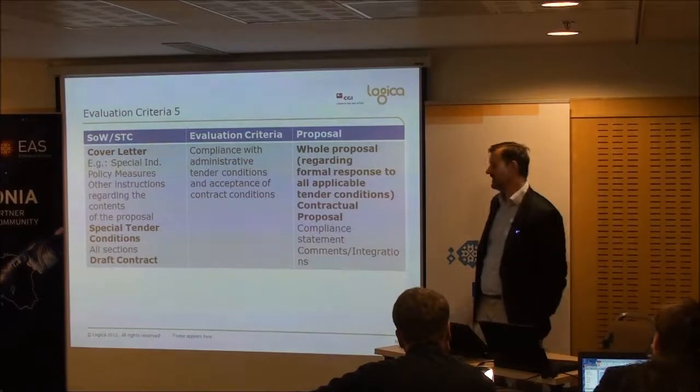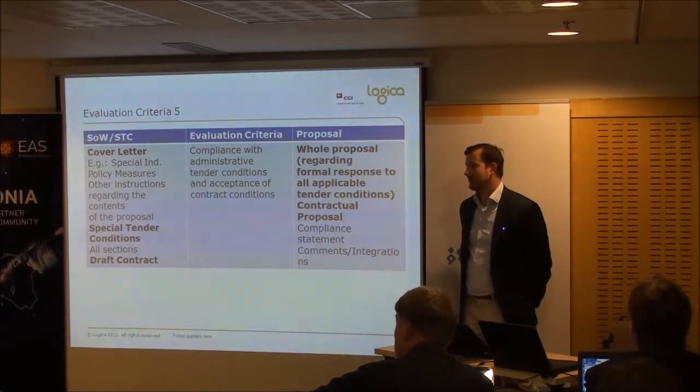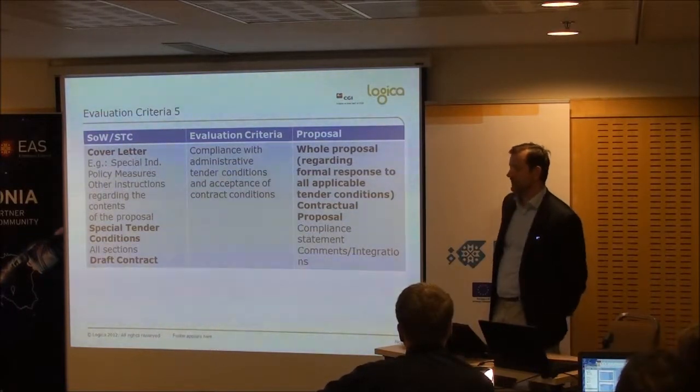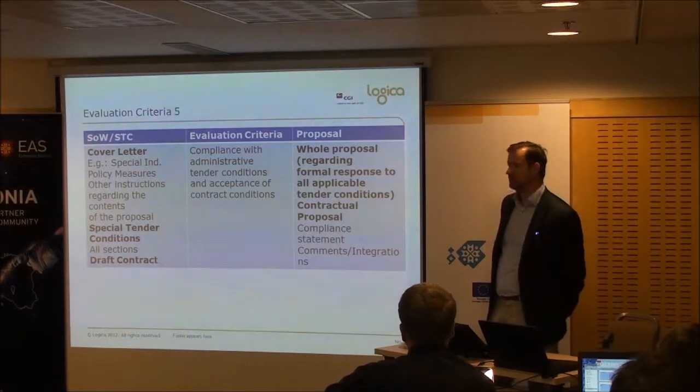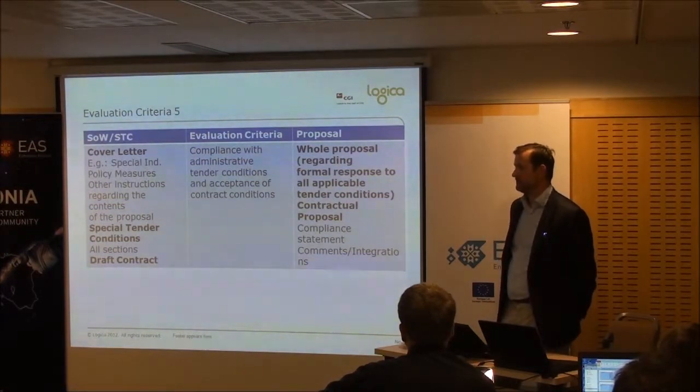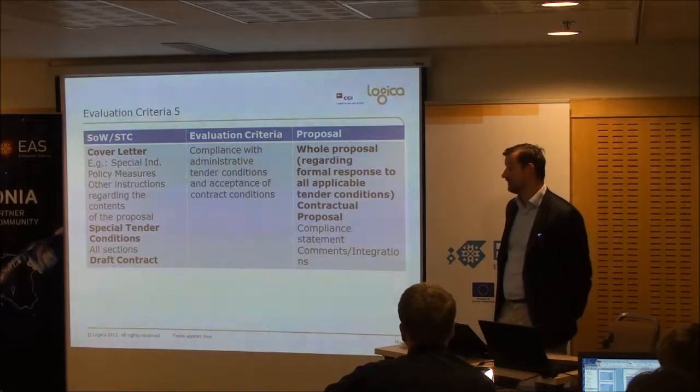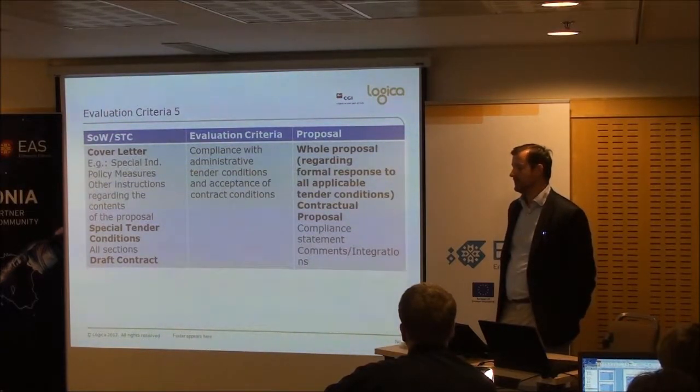Yeah, okay. So in the cover letter there will be a process for receiving clarifications, and it will normally end something like a week before submission. There'll be a deadline cut off that you make yourself aware of, and any clarification raised within that window will be responded to, but to everybody. Once you're into that situation, it's fair game. So if you have a question, then everyone will get the answer to it.